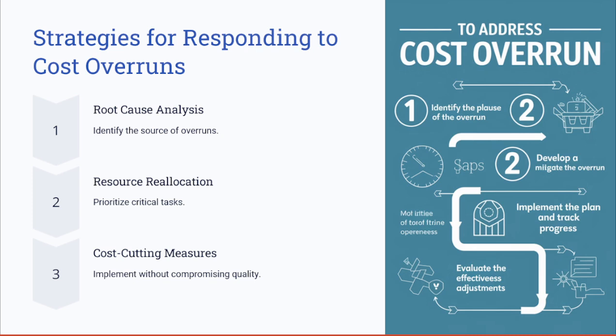These are the top key strategies to respond to cost overruns, which could impact the budget baseline. For example, let's say there is a software development project that experiences overruns due to long testing periods. It can address the issue by streamlining the test cycles or reallocating the resources. By taking these corrective actions promptly, teams can realign their cost with the baseline.